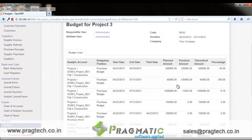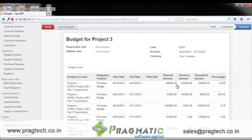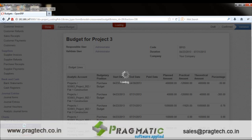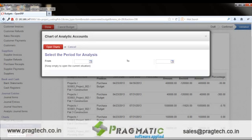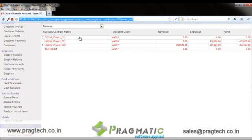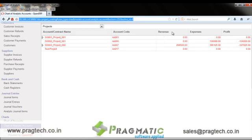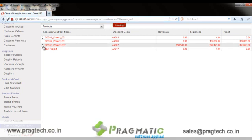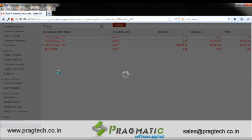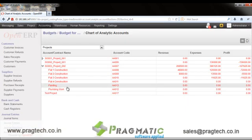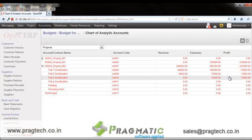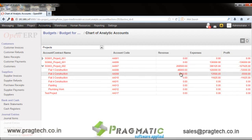Users can monitor the budget for each project this way. Task-wise and project-wise profitability can also be assessed through the chart of analytic accounts. This provides a summary of project-wise profitability showing project name, revenue, and expenses. On drilling down, users can see a list of tasks with revenue and expenses for each, enabling profitability comparison at both task and project level.